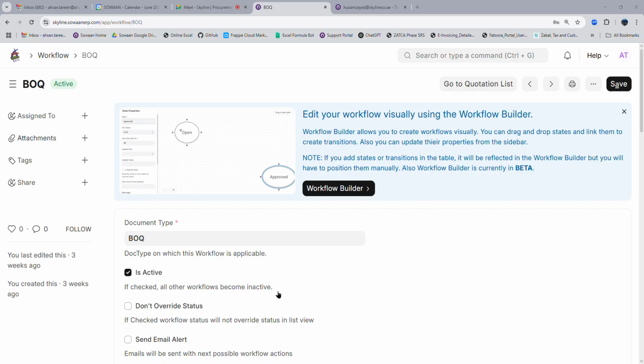So for each line there is a required date, and the unit of measurement is there. And if you want this date to be applied automatically to each line, you can just choose it again, and the system will populate the required-by date for each line, which you can even define or change differently for any other line.